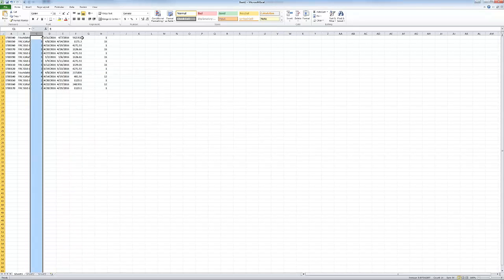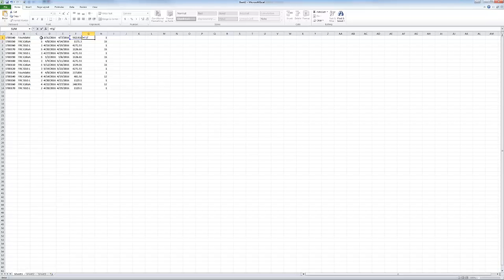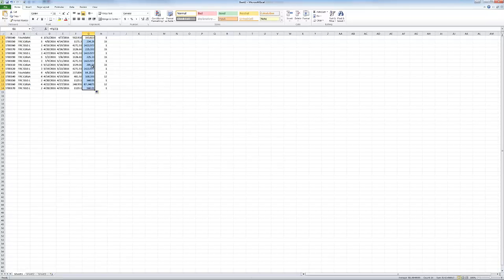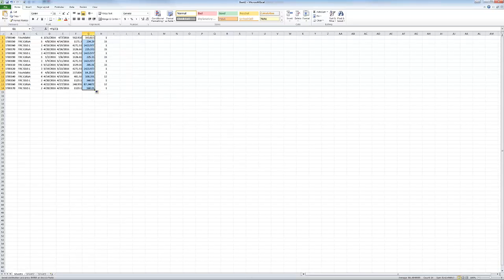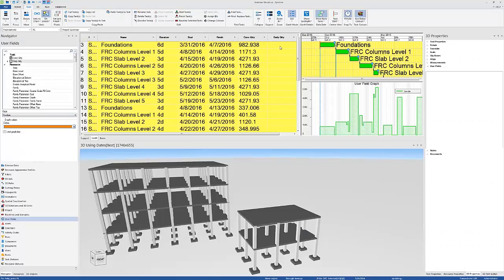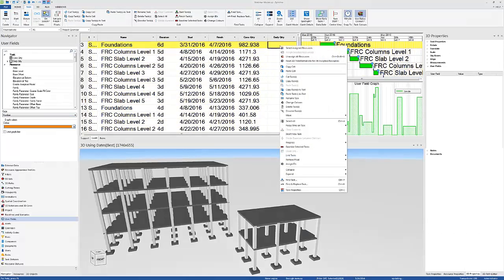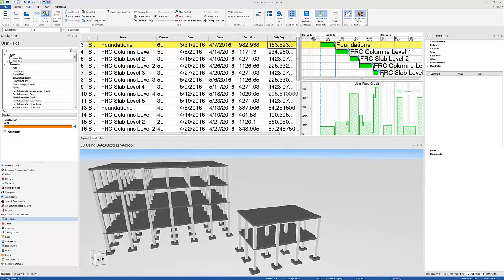So now I can go there and click equals this divided by that. So we're getting daily quantities. I'm going to do that, and then I can copy these and populate them directly in Synchro by clicking here, right-click, paste tasks as text.